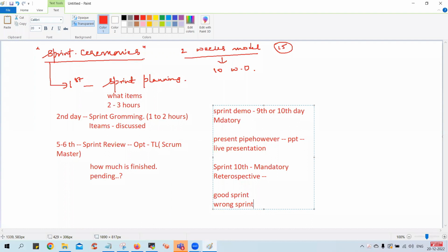So in the retrospective, whatever decision is taken, that this went wrong, the agenda is not to repeat it again. That's the essence of having a retrospective. Whatever went wrong or what we could not do better, that feedback is taken, and it is the responsibility of the scrum master not to let it repeat. Clear?